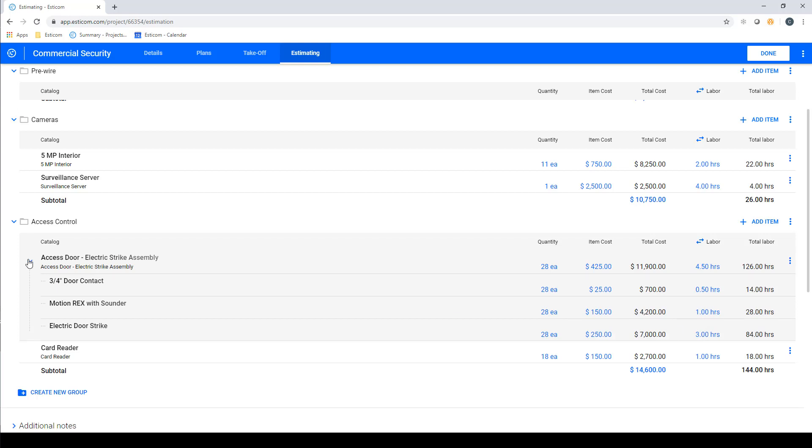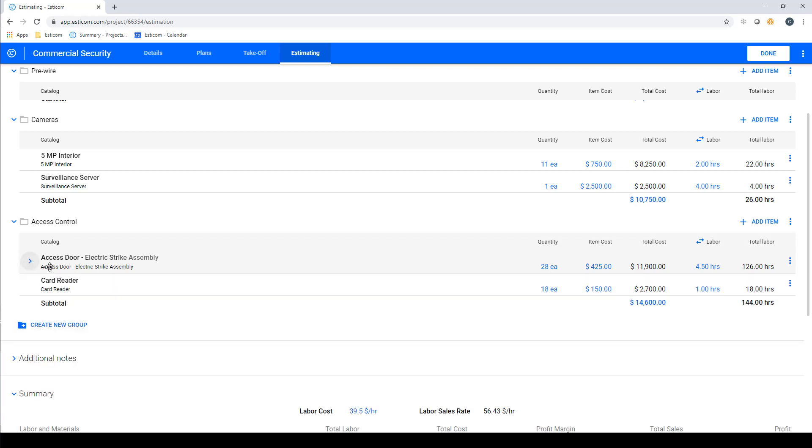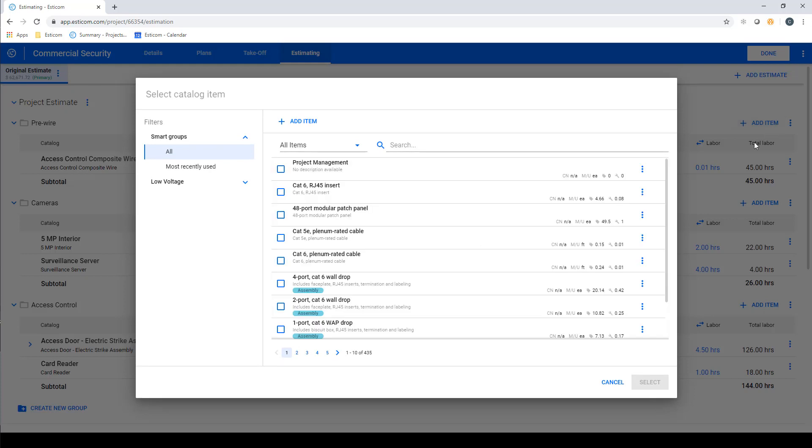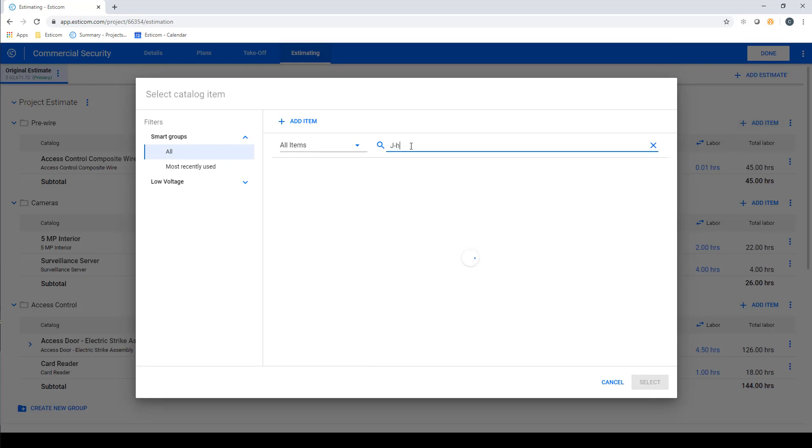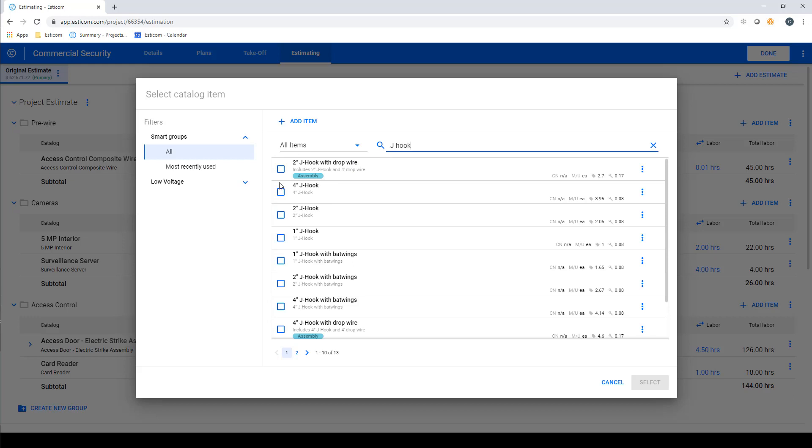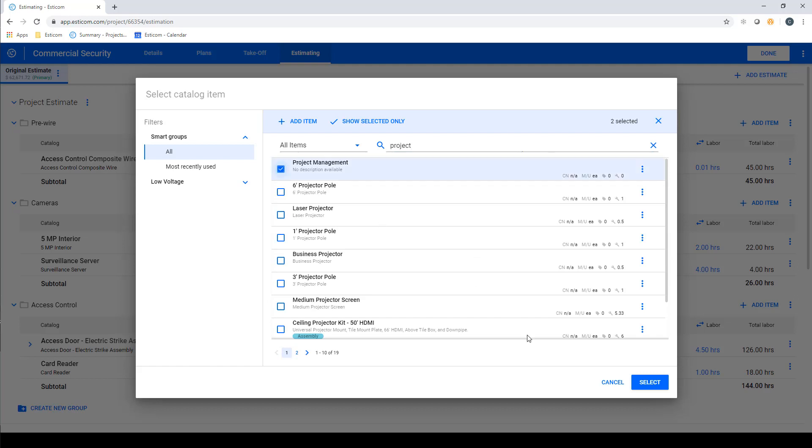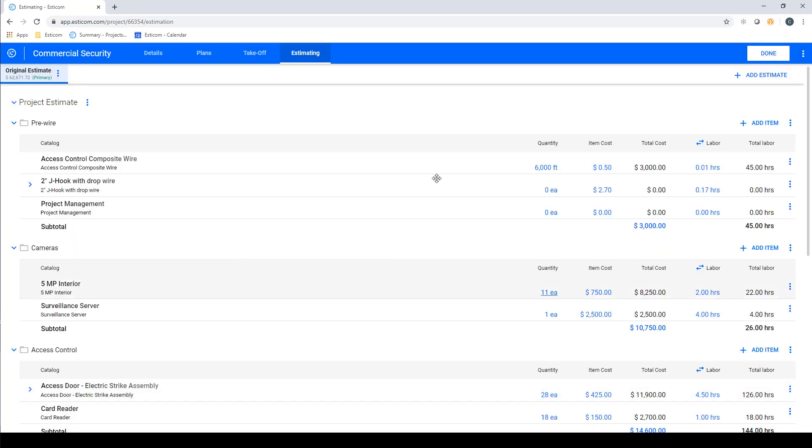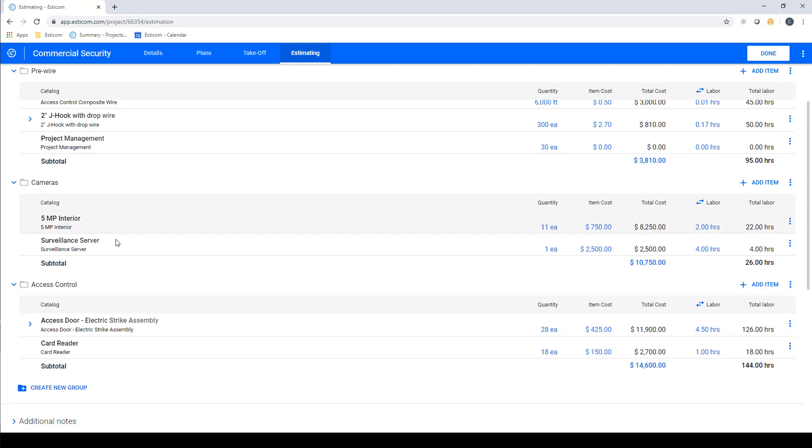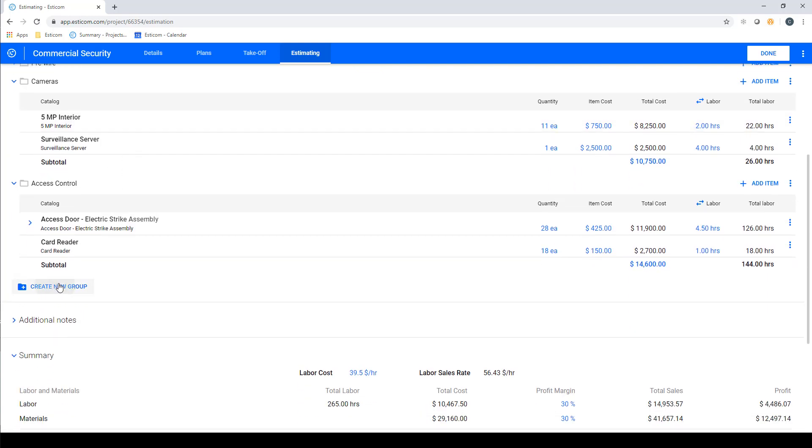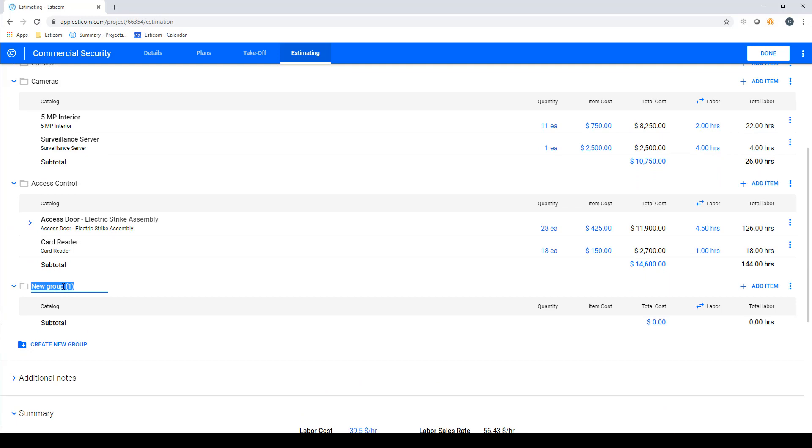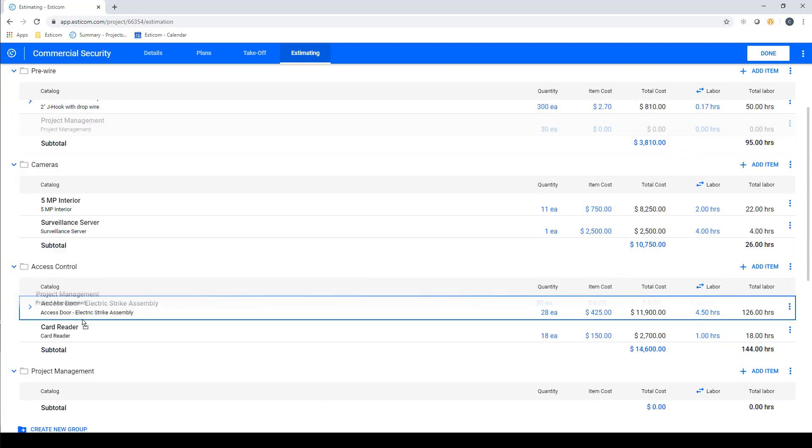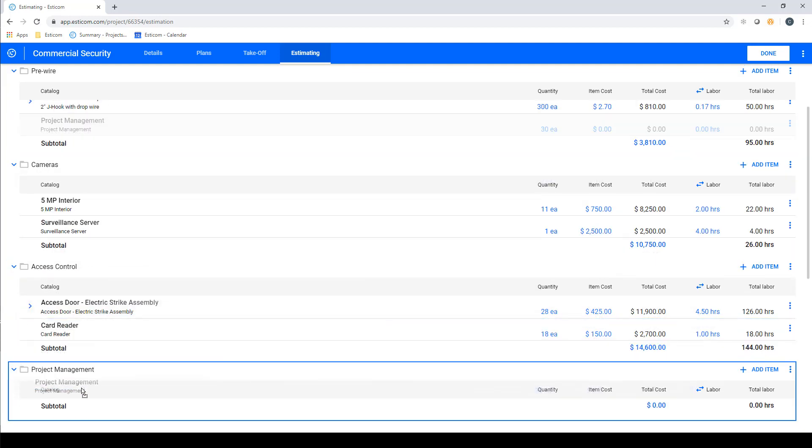You can also add items not depicted on the drawing by clicking add part. In this example, we want to include some cable support items like j-hooks, as well as project management time for training, creating as-builts, and project handoff. Once the items are back on the estimate, we can set the quantities and adjust the cost or labor. Now I'm going to create a new group called project management and drag the new project management task to that group.